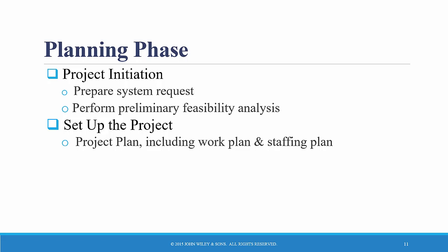The system request is the key deliverable from the planning phase, and once the project is approved, it enters project management, during which the project manager creates a work plan, also a key deliverable, staffs the project, and puts techniques in place to help control and direct the project through the entire SDLC.